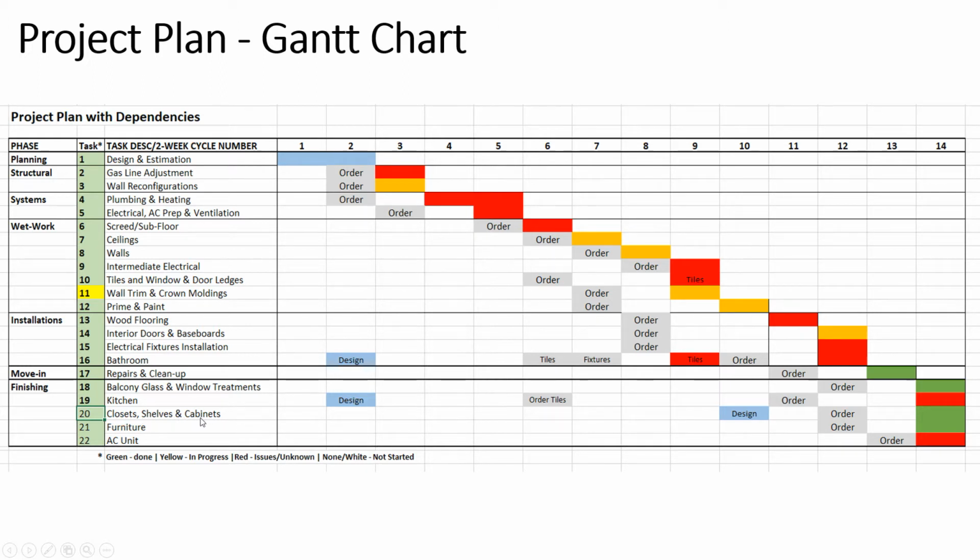I mean, you could do this earlier, before the move-in phase, but it is quite extensive and it takes a long time to order things, and it's probably better to have this done after move in so you don't postpone, because there can be delays. I can tell you that. In this age of COVID and everything, Ruslan, who makes the closets and cabinets, he got the virus and he was pretty sick and he was out for 6 weeks.